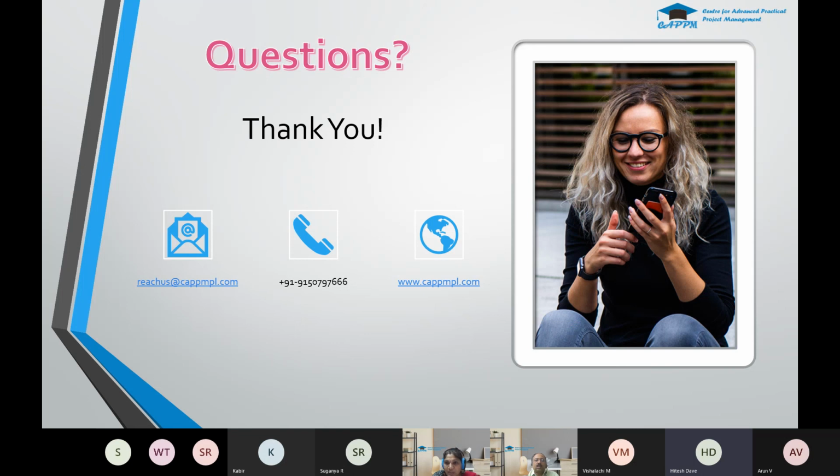The team members can access their set of information, and the project manager at the overall level can access the high level project information. Team members also can update using the task or the timesheet options, timesheets in Microsoft Project, and Progress Reporter in Primavera. Either through that they can give the update, and once it's approved, that will be updated in the plan. So the project manager can go ahead and approve, then it can be updated in the project plan.